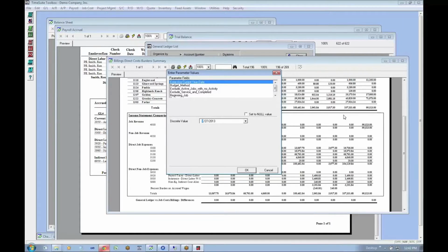And so when you start to do your current year financial statements, let's say you're a December year end and you want to do January's, February's, and March's financials, depending on when they get the audit done for you, you have to tie into that audit or reviewed financial statements, summary of contracts, in order for this to all work really well. Because the CPA's equity position is based on a certain over-under billings that comes off of those statements.